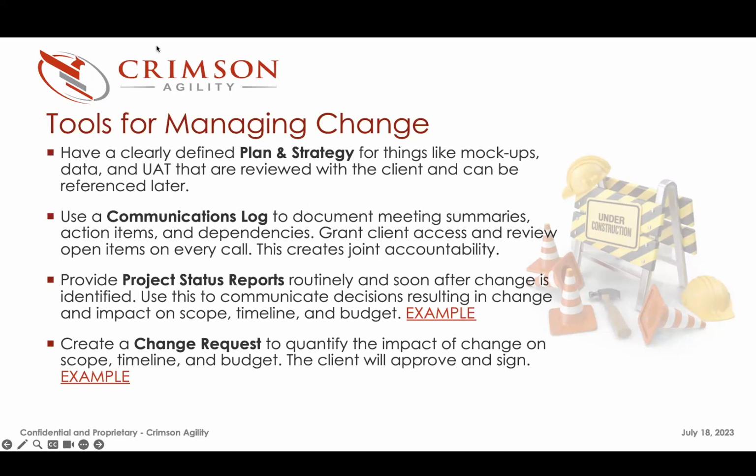Yeah. And that's what my clients have really been wanting, is just, let's get it done. Ultimately what the clients want is to know when it is going to be done and what it is going to cost. And if you can give that to them, especially as the project is winding down, if you can give them the confidence that we're going to get this done, this is what it's going to take, here's the final change request to get it done, and be confident in that. In most cases, they have that 20% contingency that they expected they were going to need. But yeah, I hope this helps.